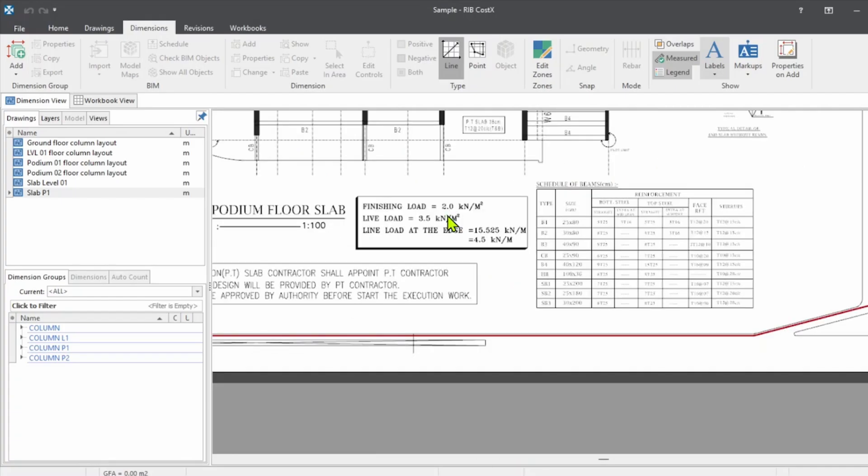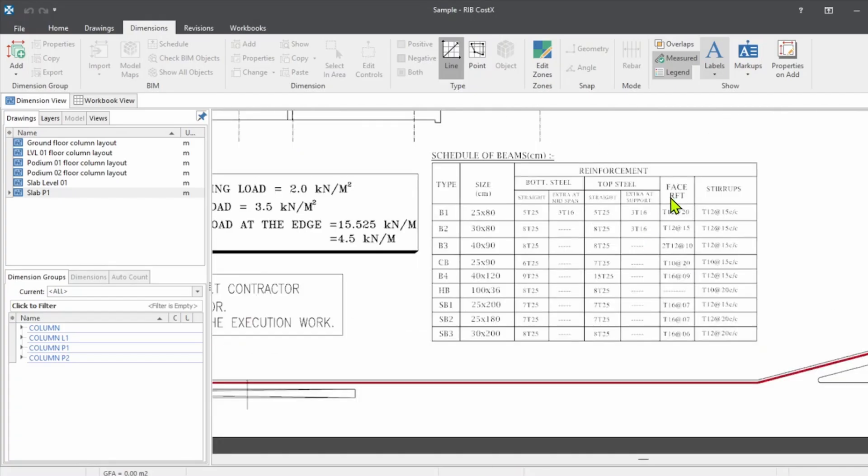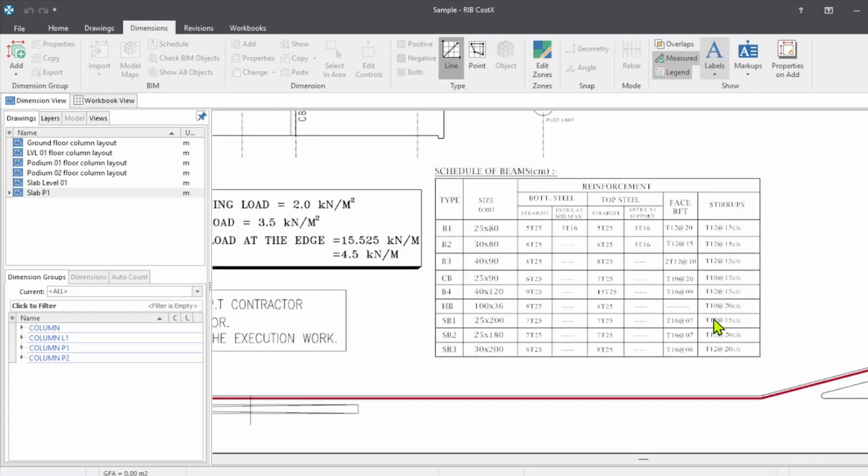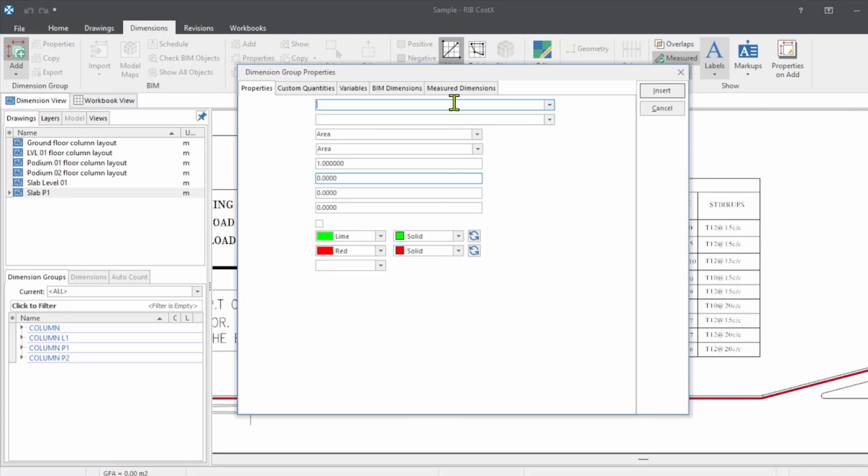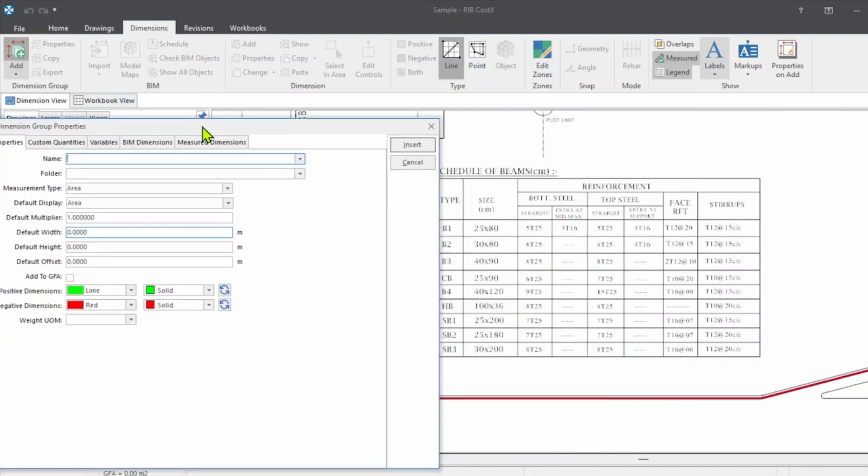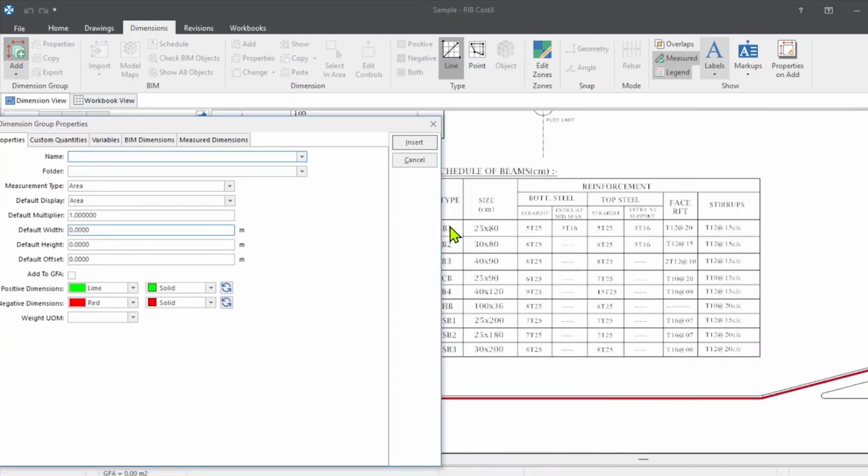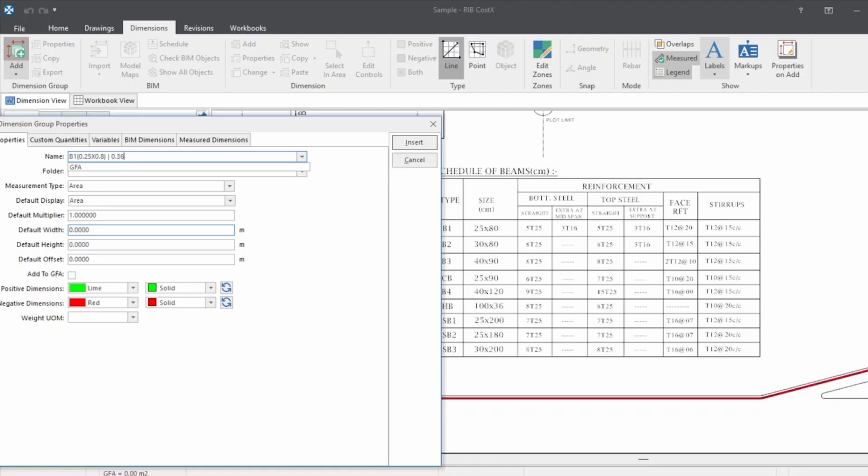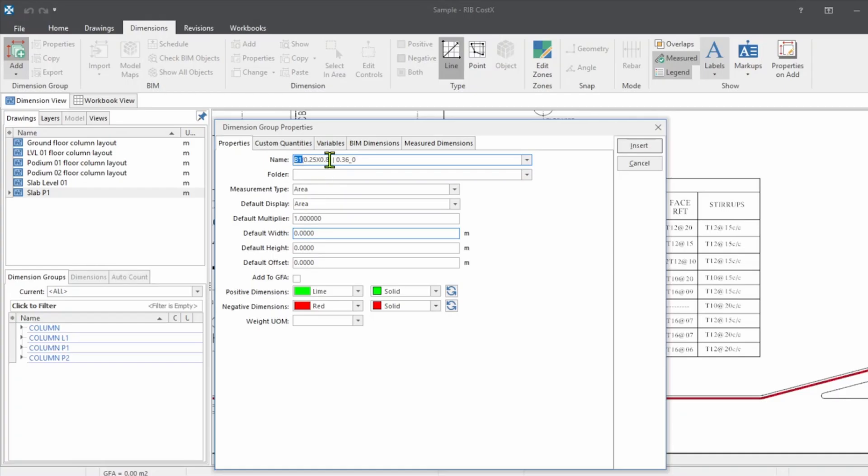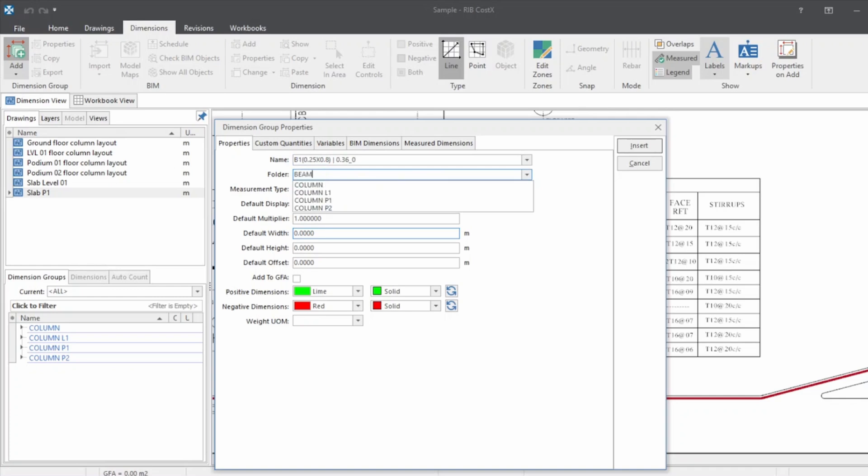So this is how the beam description will be. Move on to the dimensions. While writing the description, you can keep the schedules on one side so that it can verify the beam sizes. So the name of the beam is B1. Going to write the size now: 0.25 by 0.8, followed by the thickness of the slab, 0.36 and 0. Beam name, size of the beam, and thickness of the slab on either side.